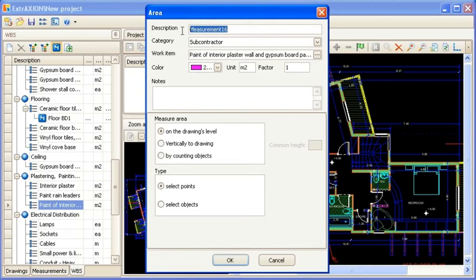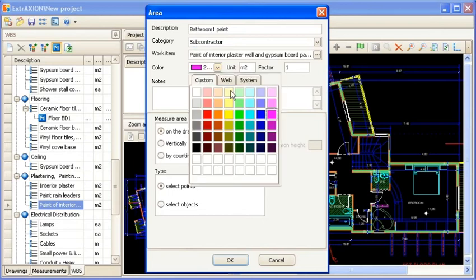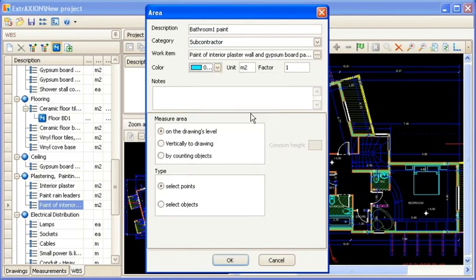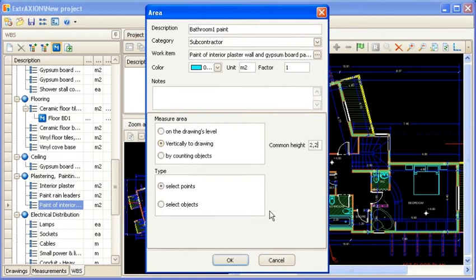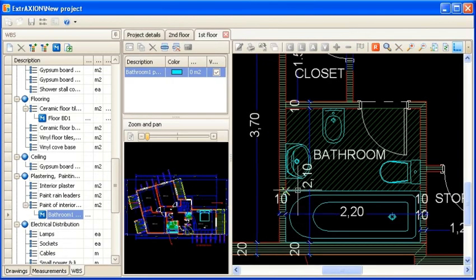After setting the appropriate description details, in this example we are measuring bathroom paint, you can select the vertically to drawing option in the measure area box. This enables you to set the surface height in the common height box. Vector drawings give you the advantage of using the OSNAPS function.